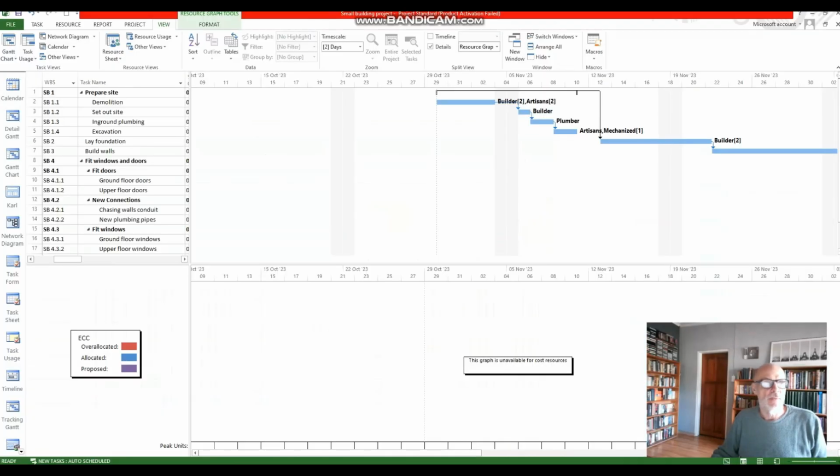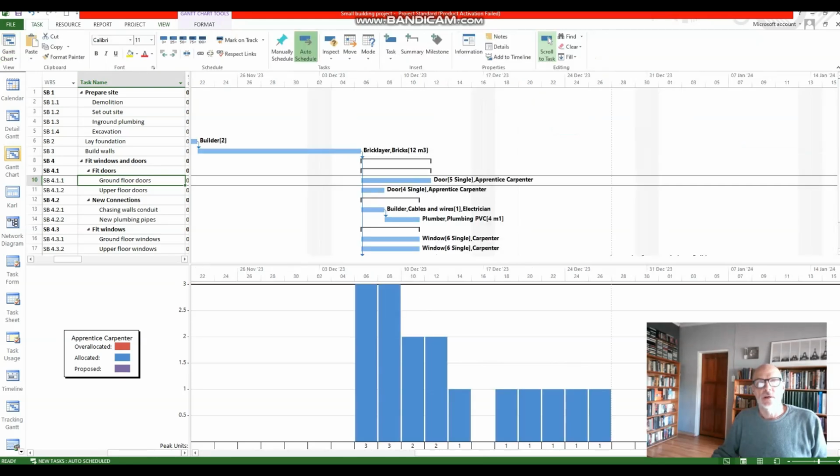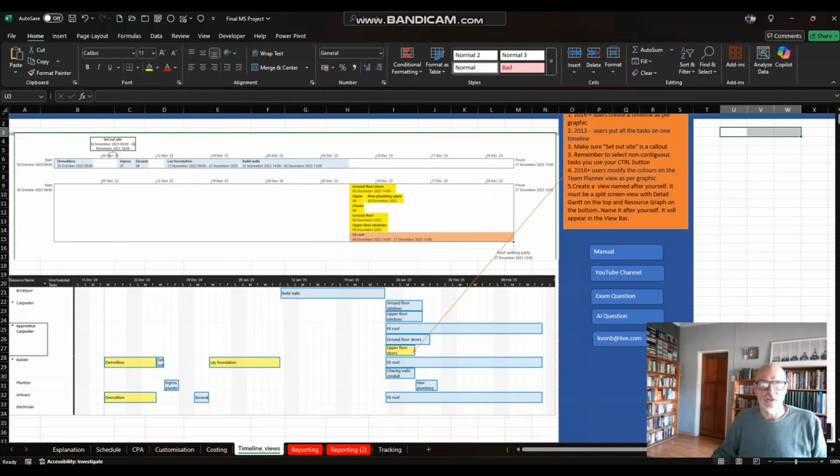So you need to create that. And if we create here and we scroll to task, you'll see there, you've got the beautiful Manhattan over there. That's what I want. I want that view, but the detail Gantt on top. And I want, just like mine is over there, I want your name on the left-hand side. Okay, you know how to do that. Okay, just here's a clue. Click on More Views, New, Combination.